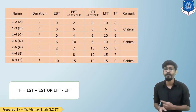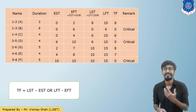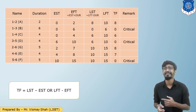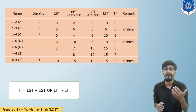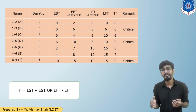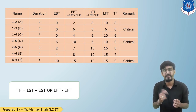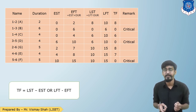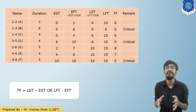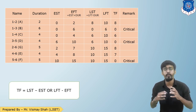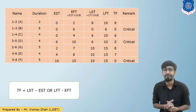Here is the table of floats showing columns for EST, EFT, LST, LFT, and the total float with remarks. EFT is above the arrow at the head; LFT is below the arrow at the end. EFT equals EST plus duration; LST equals LFT minus duration. Total float is either start time subtraction or finish time subtraction. You know all the formulas as we have been doing this since chapter four — that is how we prepare the entire table.